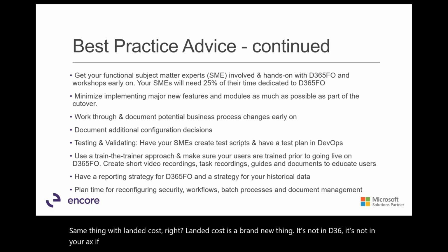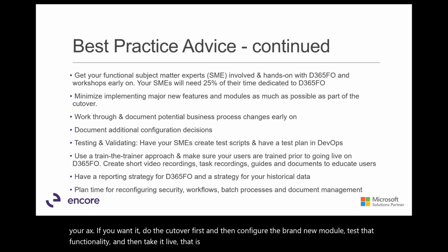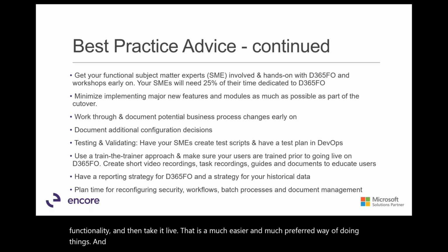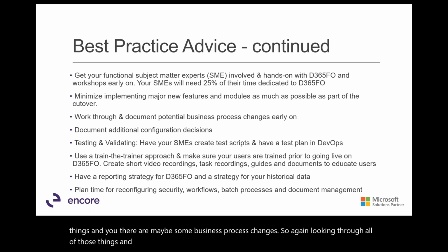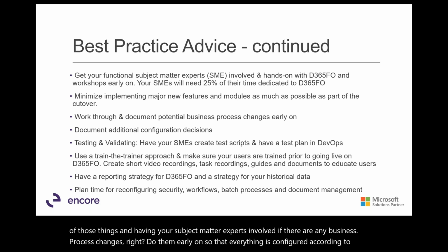If you want it, do the cutover first and then configure the brand new module, test that functionality, and then take it live. That is a much easier and much preferred way of doing things. And there may be some business process changes. So again, look through all of those things and have your subject matter experts involved. If there are any business process changes, do them early on so that everything is configured according to what you want the process to be.